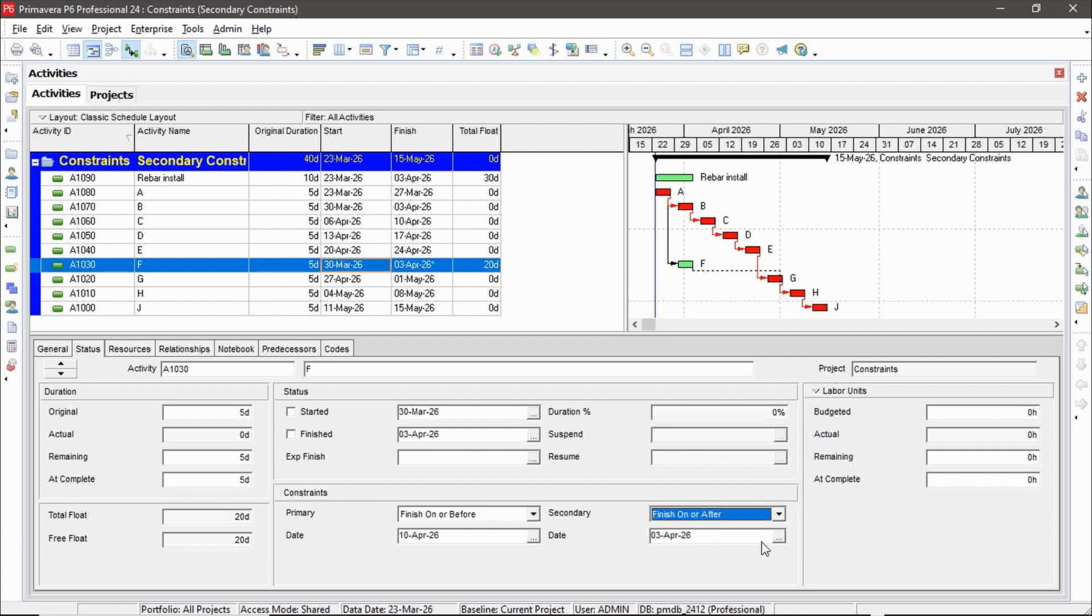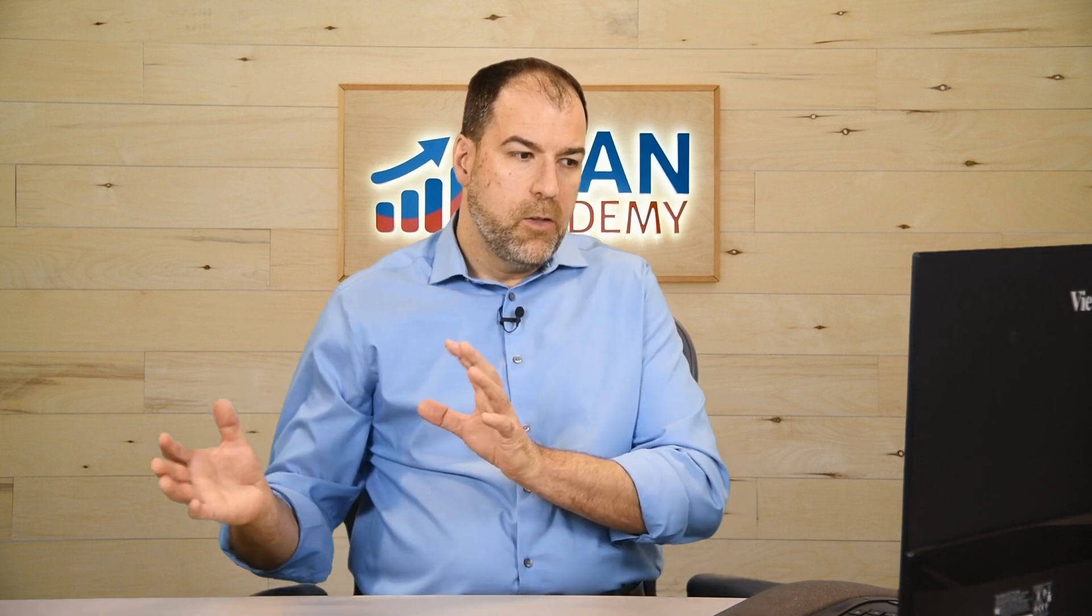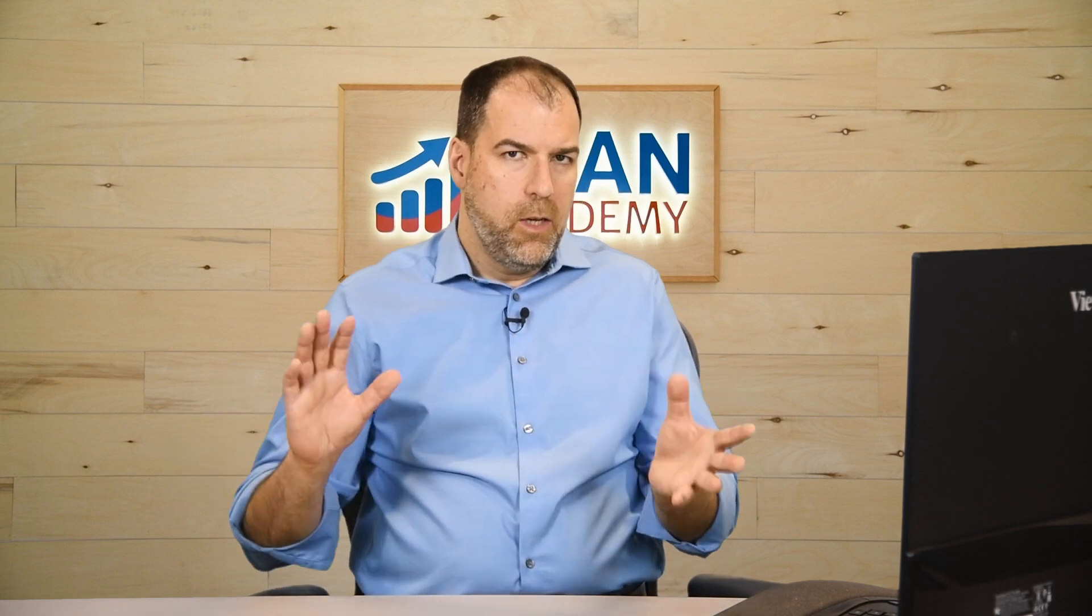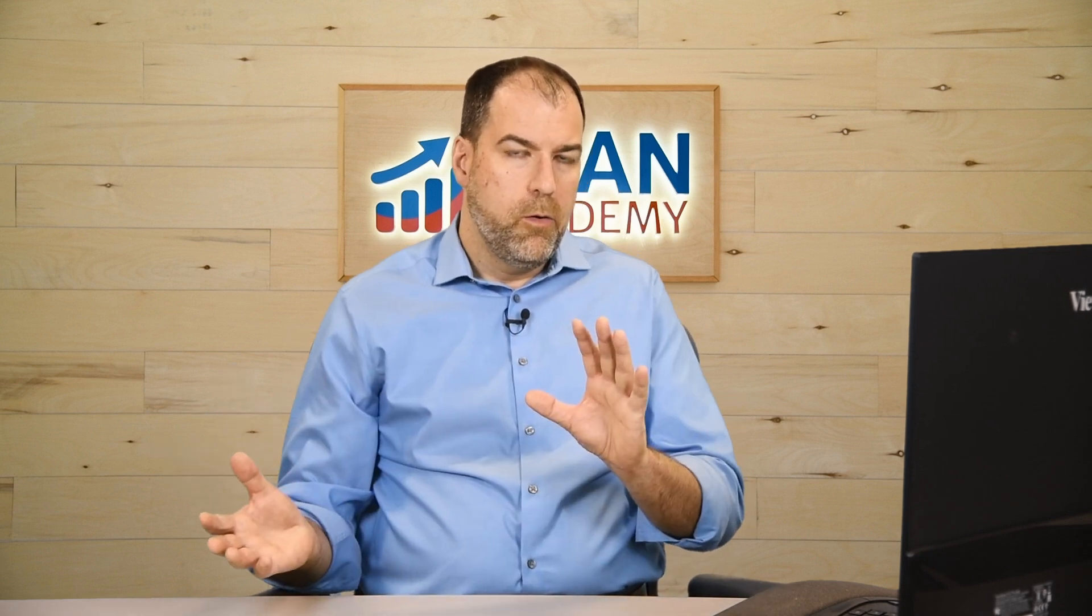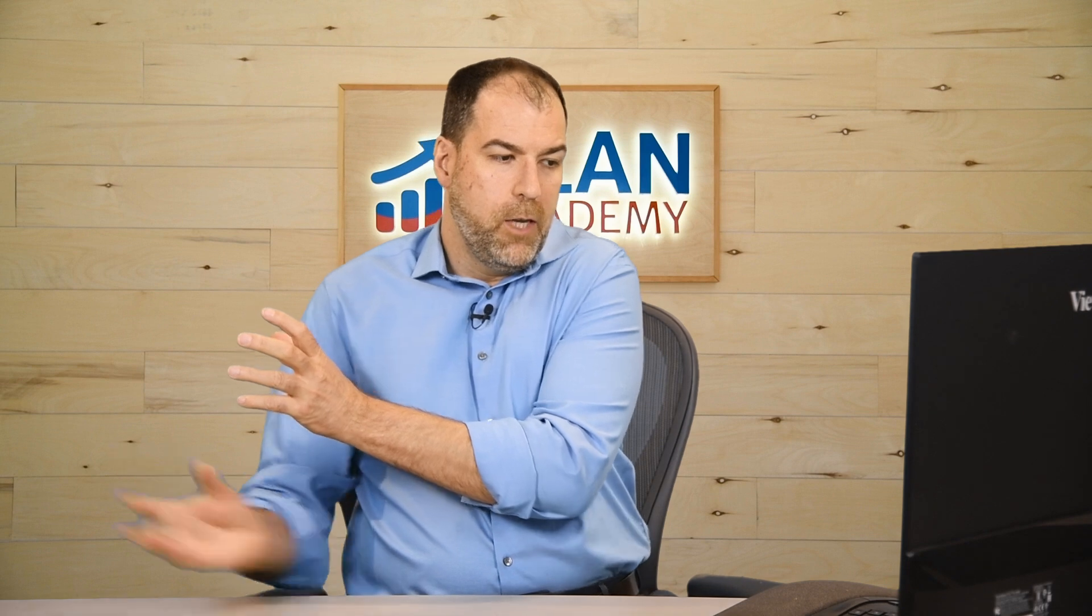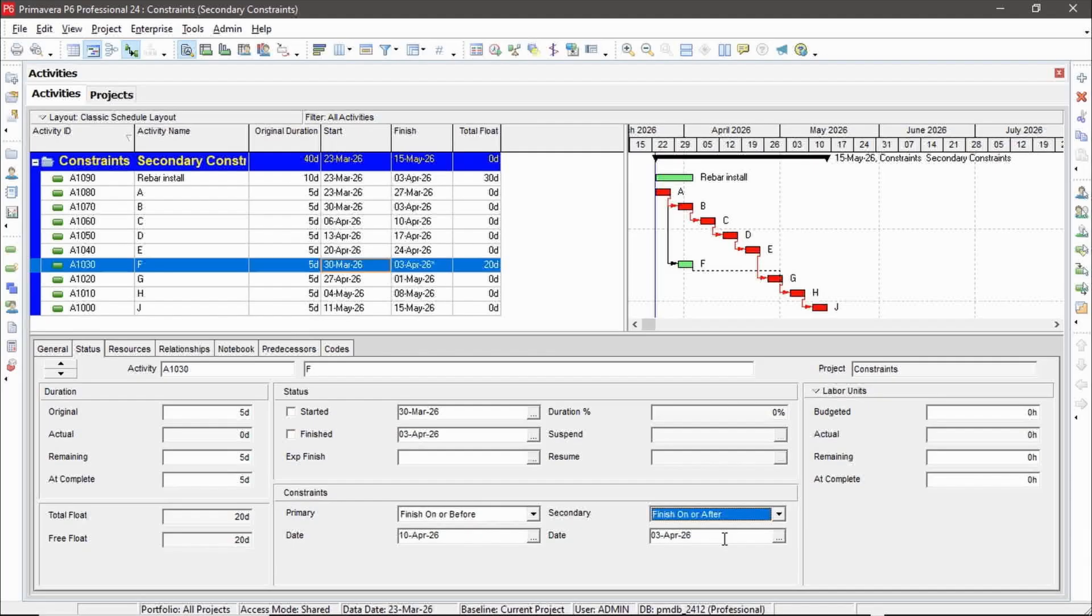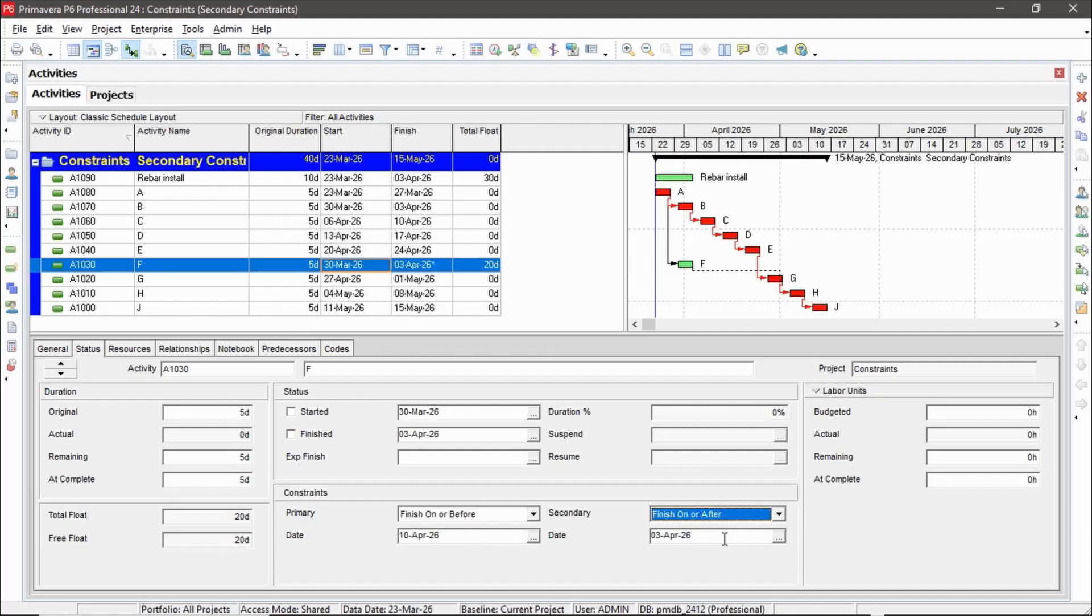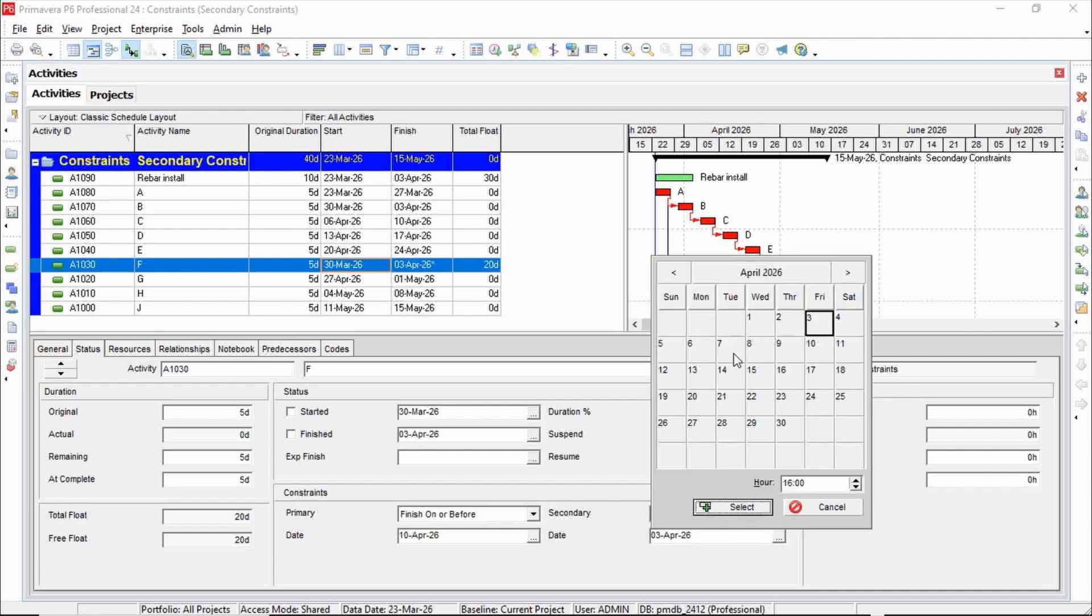It allows me to set another range or constrain that range for finish dates, finish on or after. So this is actually, this is a bit weird, but I have the last finish date in the primary field and the first finish date in the secondary field. And they can be interchangeable. So either one's the primary constraint or the secondary constraint, it doesn't matter.